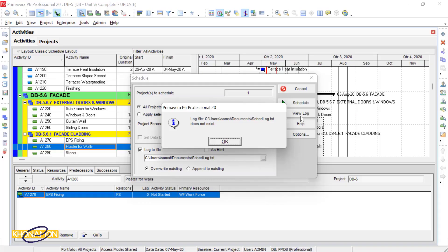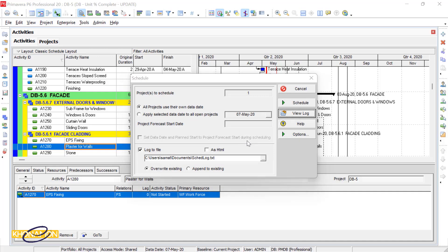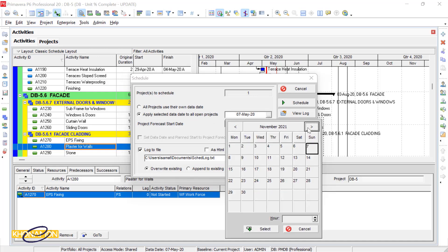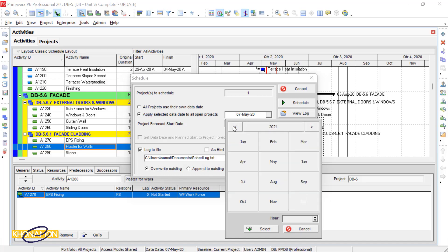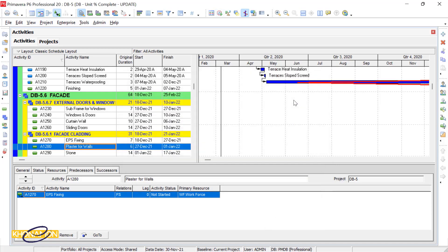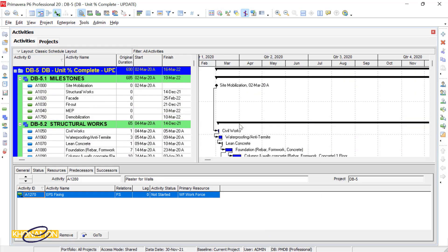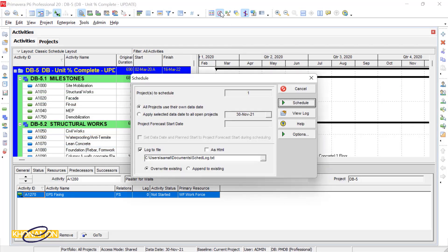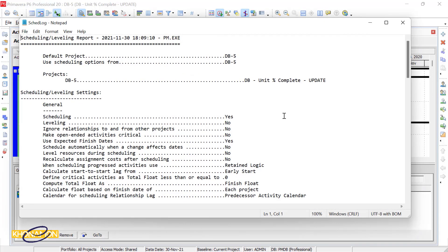First we need to schedule the project — it means we write the project. Select today's date as the data date, then press Schedule. It is now scheduled. All dates are fixed and set according to the links, lags, and durations. When we press Schedule, we actually set the project and write it. Now if I go to Schedule and select View Log, the log report is shown.